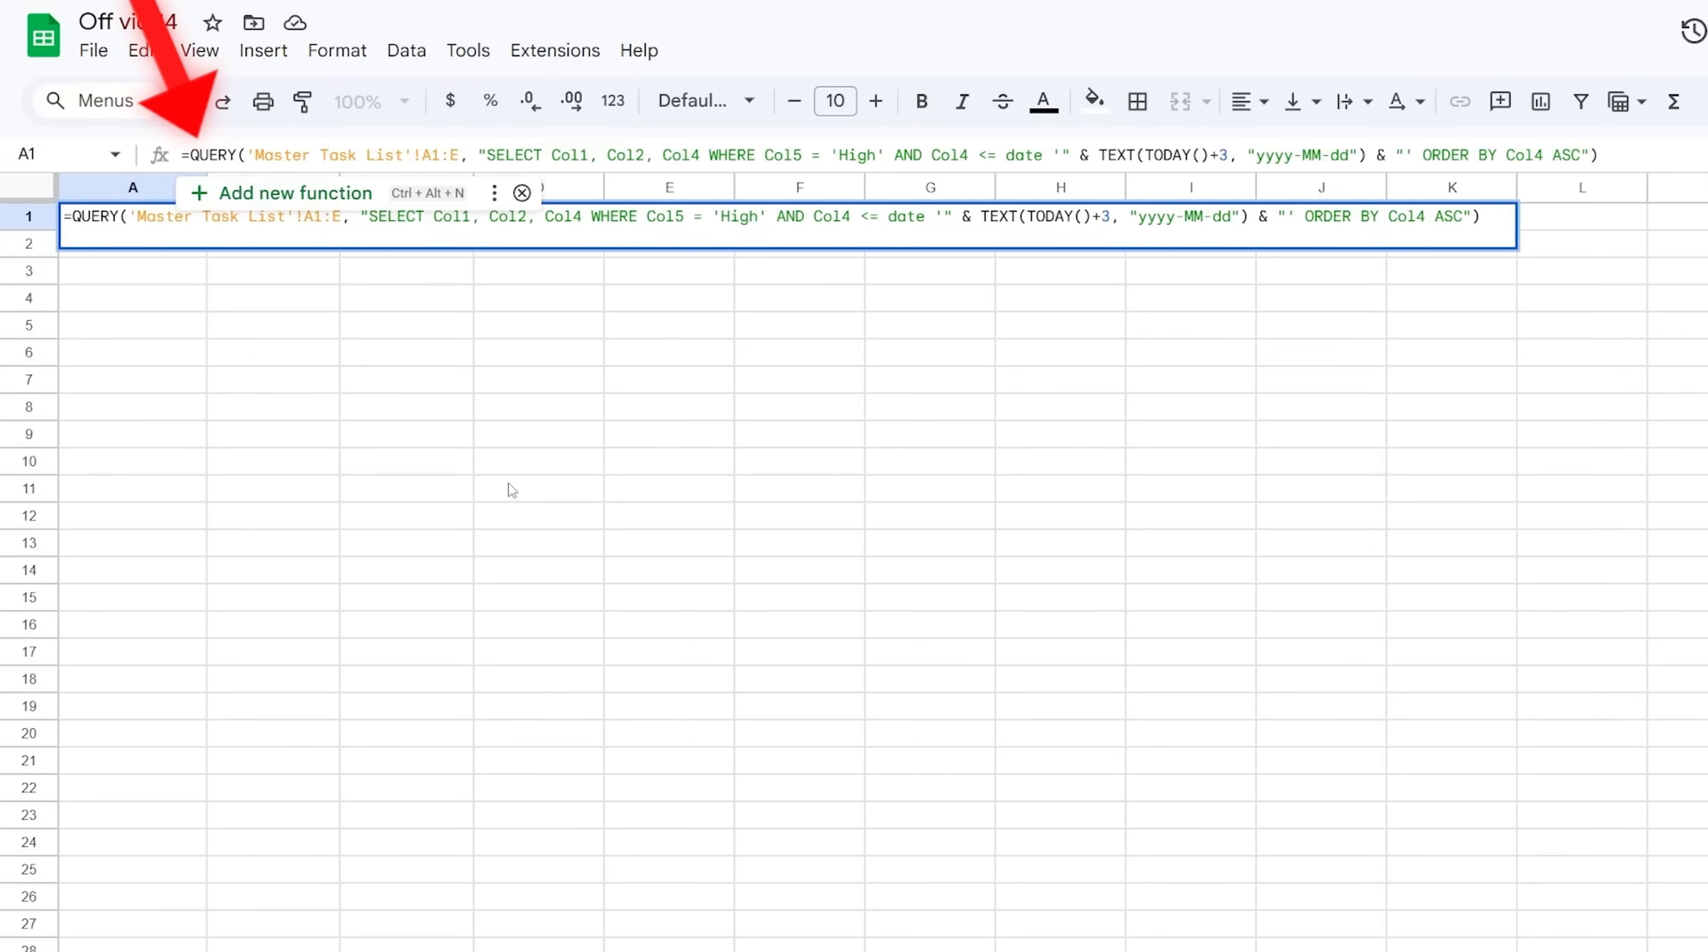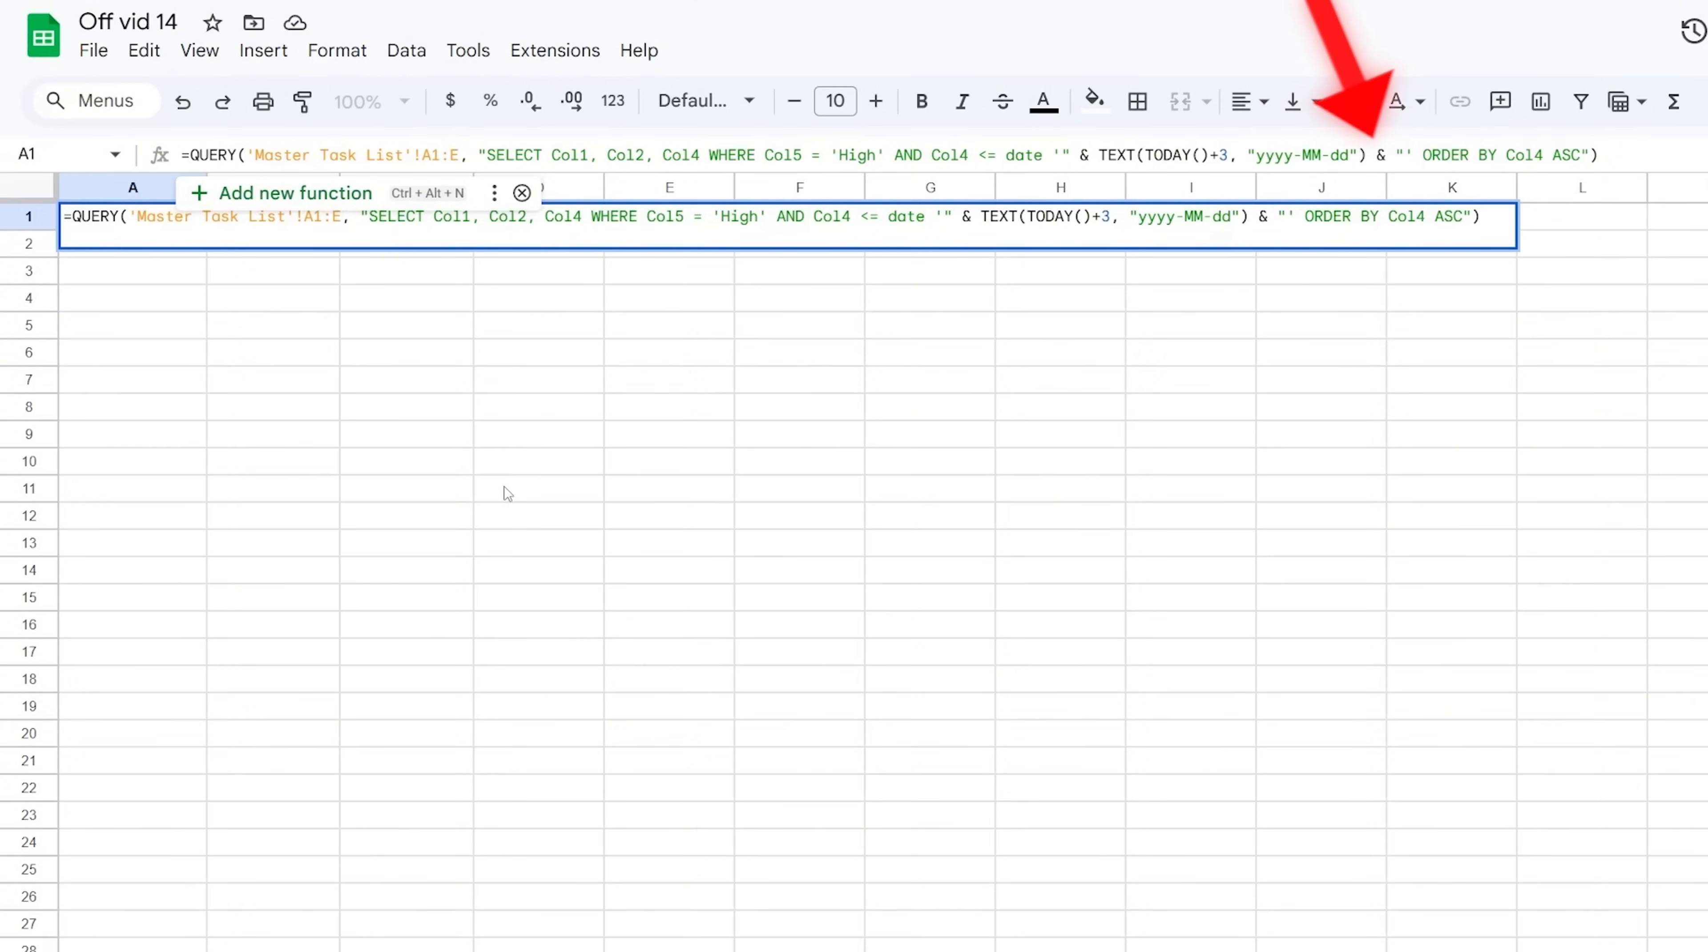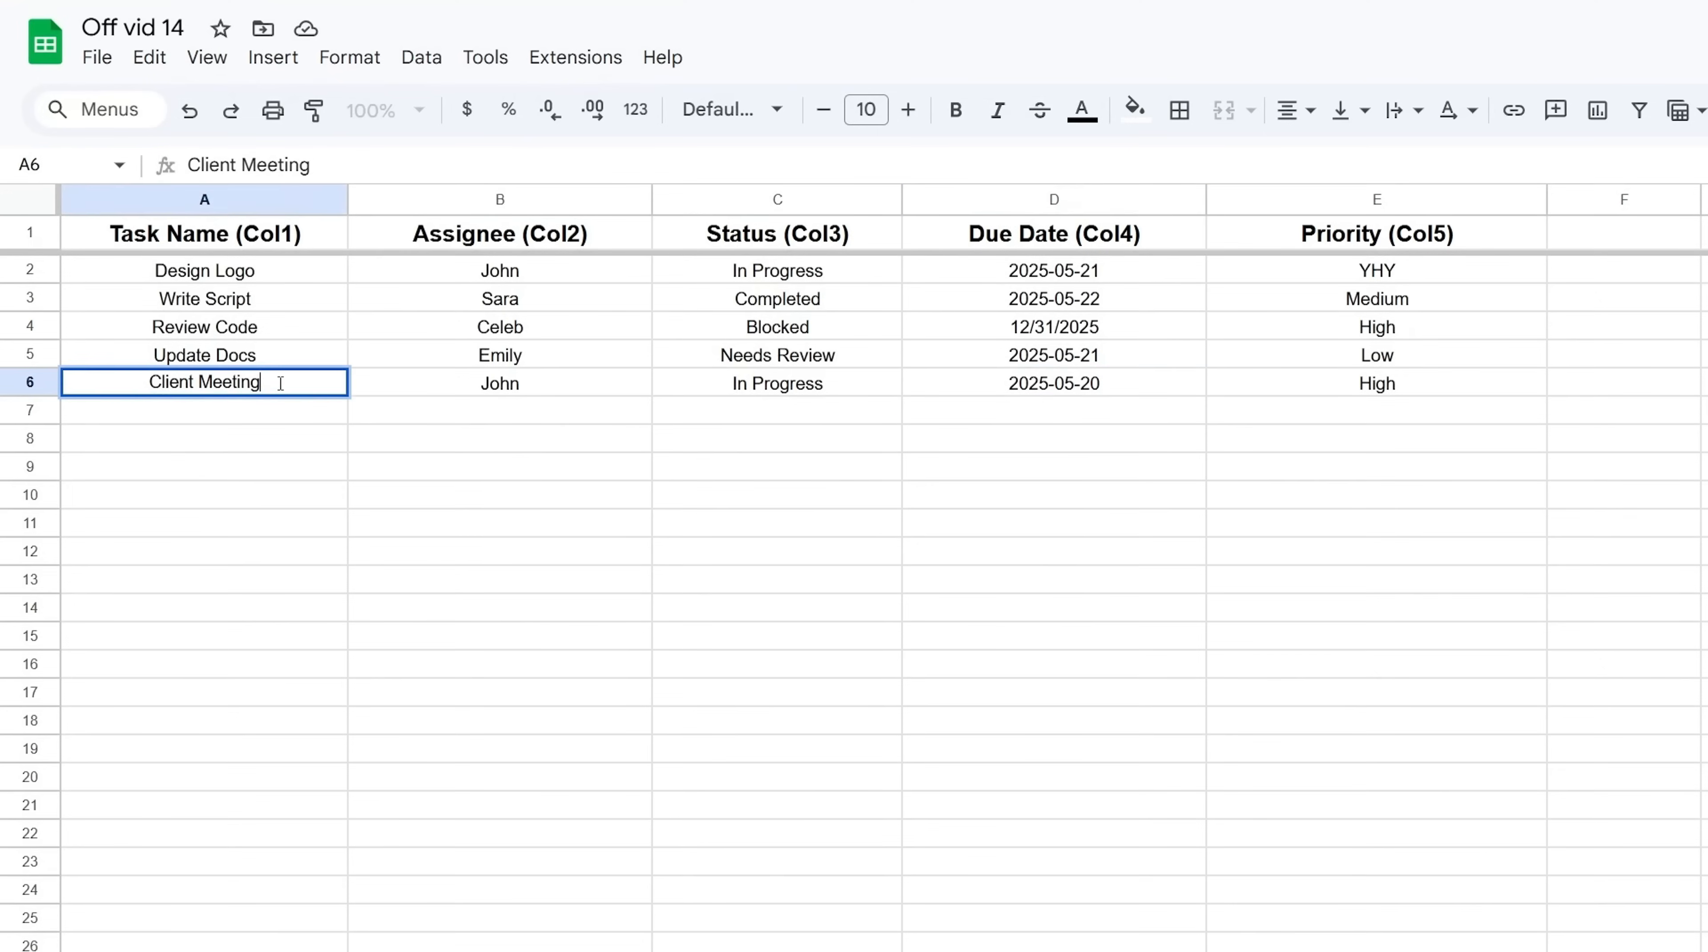Like this: =QUERY(Master Task List!A1:D500, "SELECT Col1, Col2, Col4 WHERE Col6 = 'High' AND Col4 <= date '2025-05-10' ORDER BY Col4 ASC"). This assumes priority is Column 6, and the date filter is just an example.